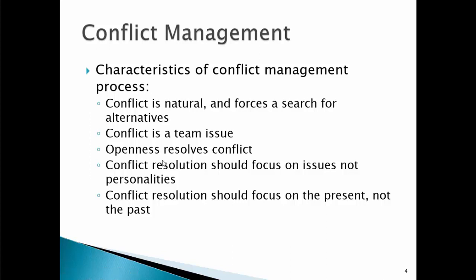Conflict will happen during project execution. At that point, a conflict management process should be put in place. The conflict will force the team to search for alternative solutions. It's very important to have an open-minded team to be able to resolve a conflict. Actually, conflict resolution should focus on issues, not responsibilities, and should focus on the present, not the past.